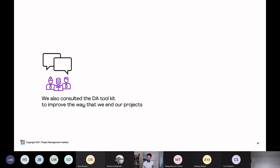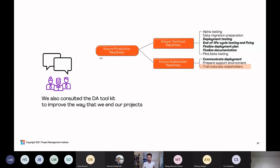Finally, the team also consulted the DA toolkit to improve the way they end their projects. They have a goal diagram for ensuring production readiness. One area where they were falling down was not training and educating their stakeholders enough before a release — ensuring they know how to use the new product, and that the help desk has an FAQ and is equipped to answer customer questions when they release the new iPhone application.